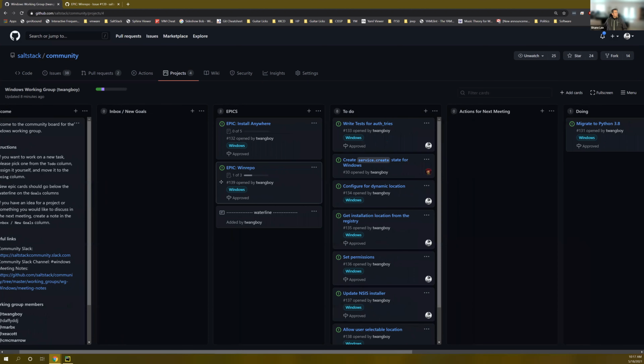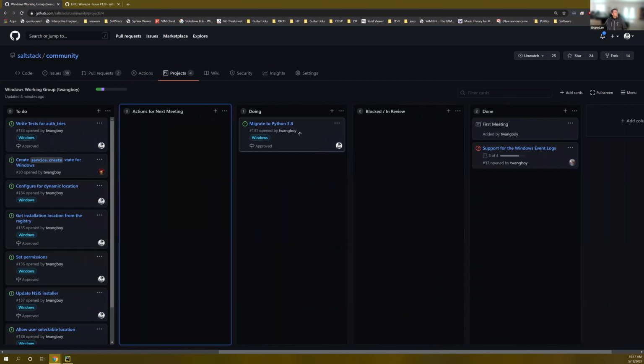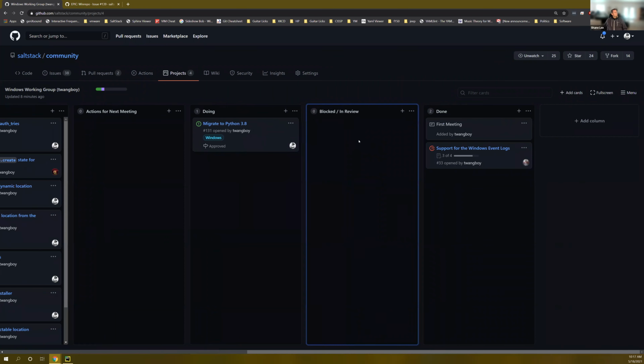Yeah. Okay. All right. So as we go through our meeting and come up with things that need to be done for the next meeting, those will go in here. If you're actually working on something, that goes in the doing column. And if you're having a problem, or you're done or you need something reviewed, that goes in blocked or in review. And when it's done, it goes over into done.